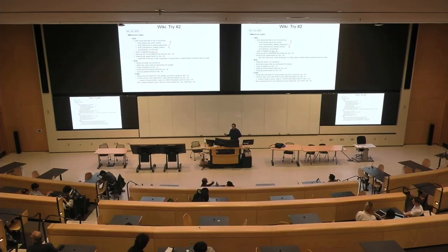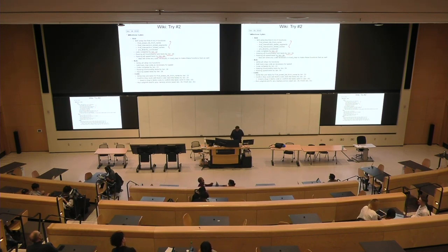Code complete is a term that means I've written the code, but it's not tested yet, which means it probably doesn't really work, but at least I've taken a crack at it. Bob's going to pass all the functionality tests by January 26th, and all the performance tests by January 29th. Those 4 functions might need some code and load map, so Bob's also responsible for that, to make them fast. And the other 2 team members have a relatively similar style of status.